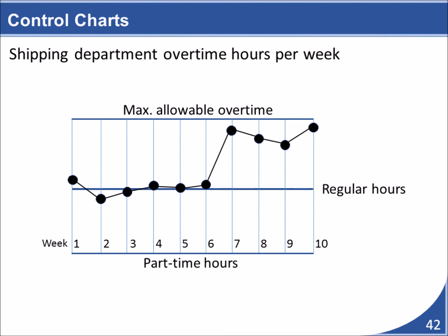In this case, I have used control charts in a little different and creative way. I have showed how a control chart can be used to graph the number of overtime hours that our shipping department records. The graph shows that on week 7 there was a jump in the overtime billing. This might provide insight into the root cause of why our deliverables are not making it to the customer.